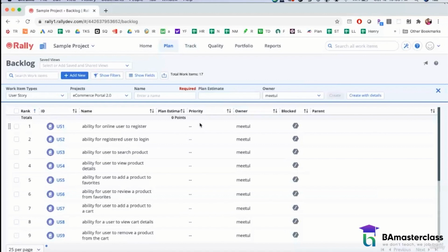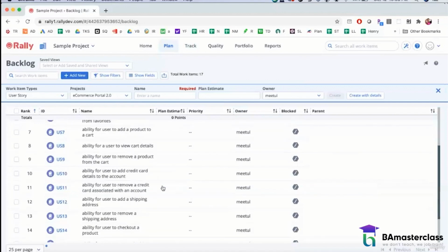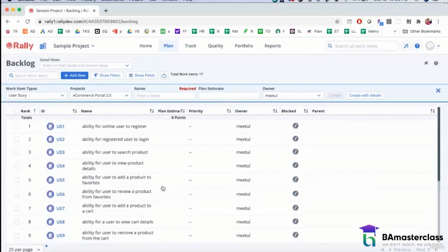On a monthly basis, I'll conduct a business prioritization meeting. I'm going to call in subject matter experts, and the homework they would have done before coming into the meeting is they would have reviewed this backlog and identified the 14 items they need delivered in the next release, which is October 28th.